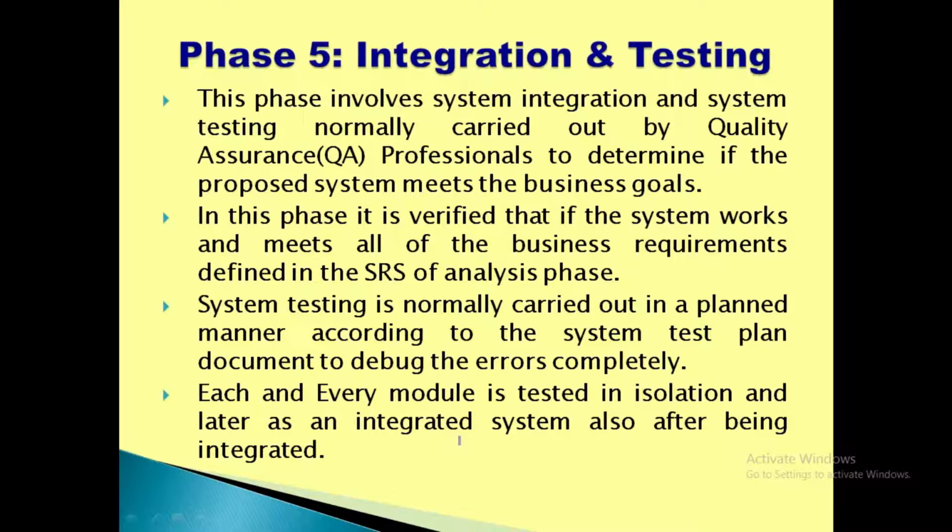Now here the target for the integration and testing phase is to test each and every module separately, integrate them and bring it to working condition. This phase involves system integration, that is integrating the various components or modules given by the implementation phase, and the system testing which is carried out by the quality assurance professionals to determine if the proposed system meets the business goals.